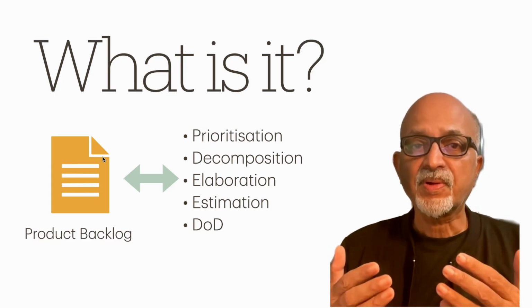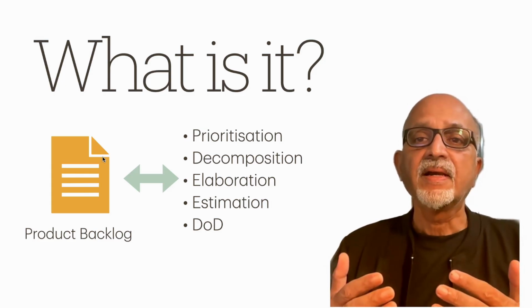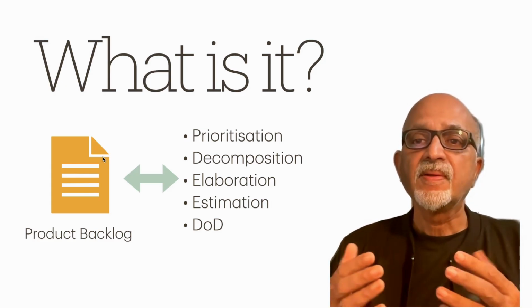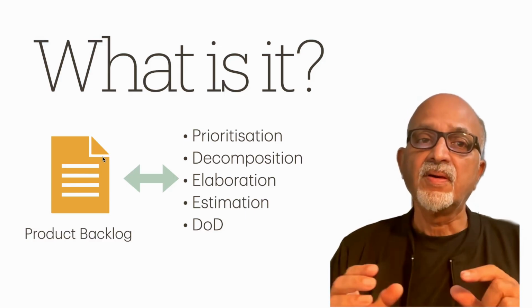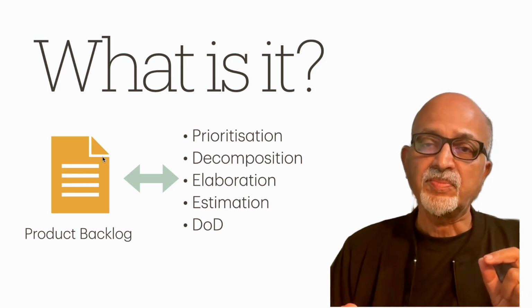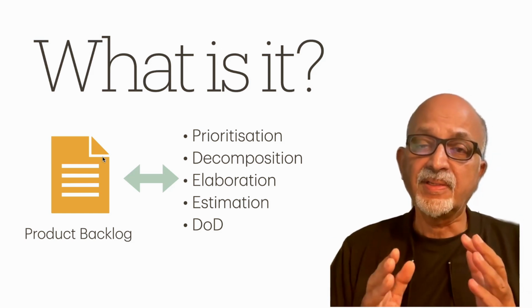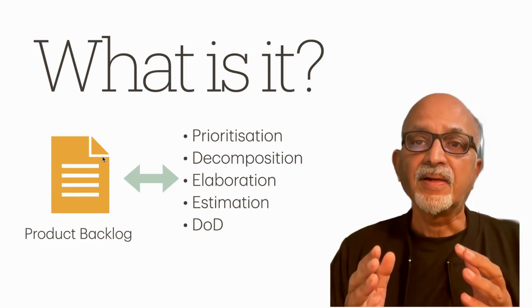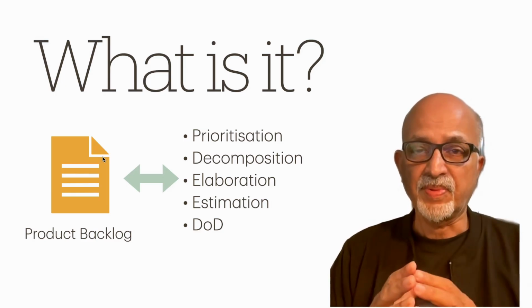And when we say product backlog grooming, the first thing is we have to prioritize. We cannot work on all the features in the product backlog. So we have to prioritize which features are getting into the initial or upcoming sprints, and those should get the top prioritization.